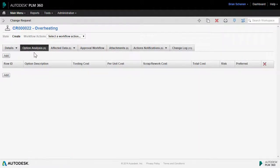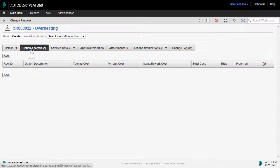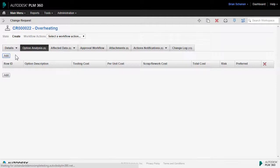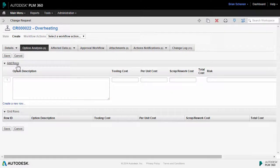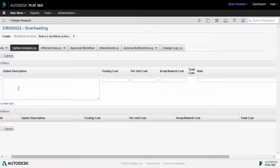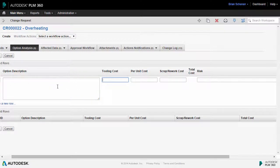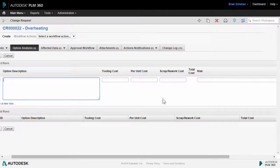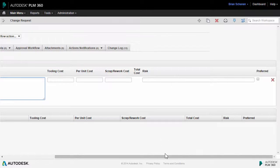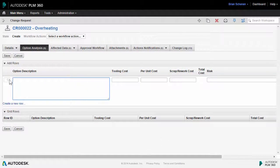Taking a look at some of the other tabs that are provided to us within the change request workspace, the next one over we see we have an option analysis. Clicking on add gives us an area where we can go in and enter in different options for resolving this particular change request. We have a description, a couple of cost fields, a risk assessment field, and then the option down here to choose which one of these is preferred. And you can have as many of these as you want.